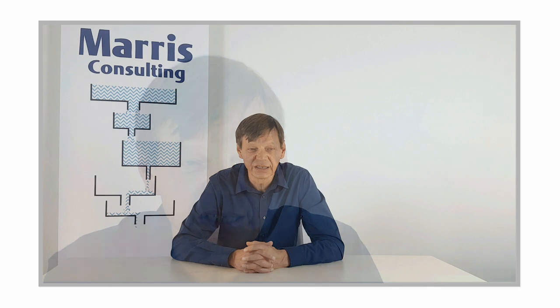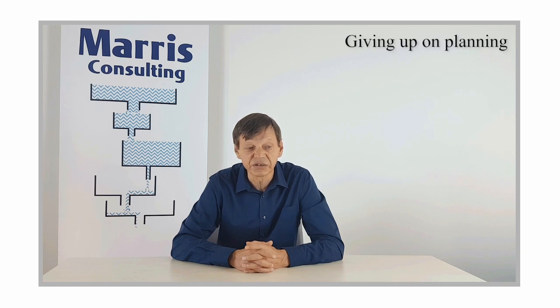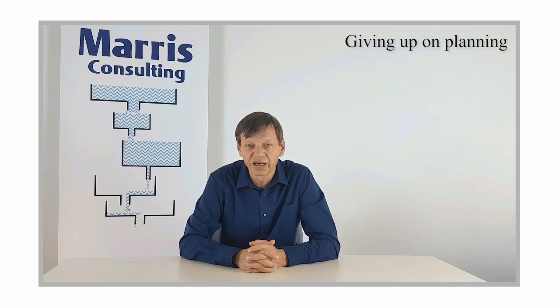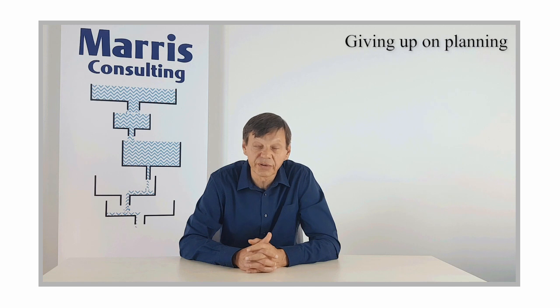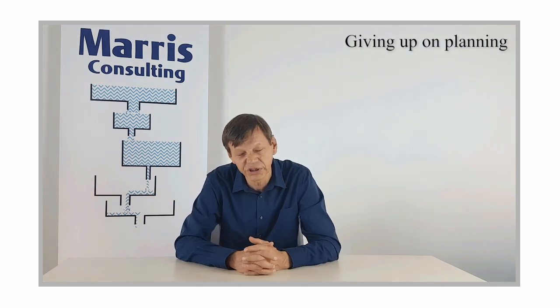The other victim is planning itself. That's to say, since we know that the plannings are not at all going to be executed as expected, that they're going to be dead even before the ink has dried, we don't spend time doing good plannings anymore, right? And the network of tasks, the work breakdown structures that we find are just very, very approximate and incomplete. We regularly audit these sorts of things, and we find there are 20% of tasks that either don't have a predecessor or don't have a successor, right? They're just sort of floating around somewhere within MS Project.